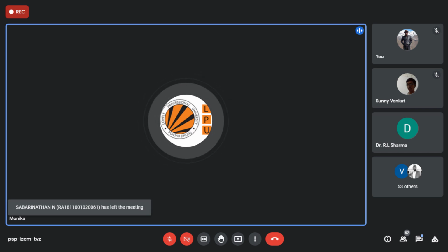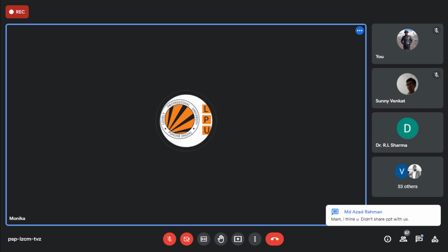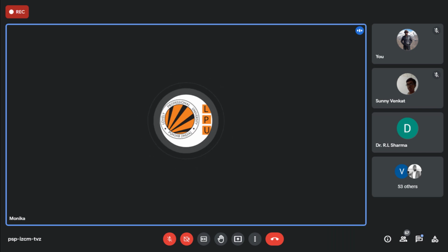Like, I want to start the third activity after the completion of the second activity, plus 1 day. The second activity will complete today, and I want to take rest for the next day. After that, I will start with the third activity. So in that case, 1 day is the lag to start another activity. So you will be able to see now in software how we assign this lag.